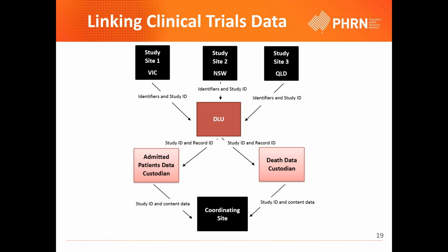But things that are less commonly linked at the moment would be things like notifiable diseases and pathology, not always routinely linked. You may have found a data collection that you think is of great interest, but it has just never been linked before. If that's the case, there will be, A, time in negotiating with that data custodian for access, and then B, extra time in actually doing the linkage of that for the first time.